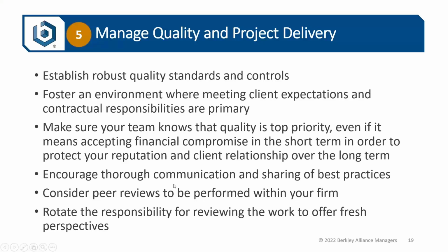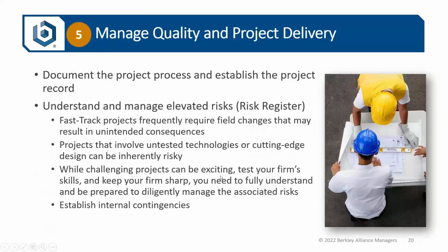In other words, having maybe a project executive or a project engineer from another project look over what you are doing, what your project plan is, what the experiences are that you have had on that project. An internal peer review is very helpful, not only to gain the expertise that exists within your firm, but again, to share lessons learned within your company. And by rotating that responsibility within your company, it refreshes people's minds and their perspectives. So it's very, very helpful.